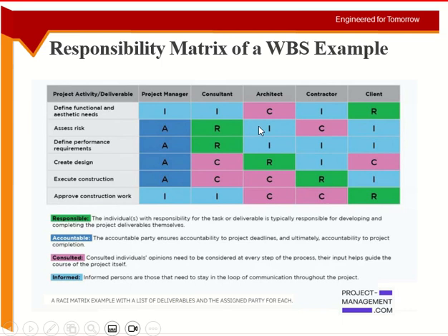It's a good practice to go back to the person who gave you the background information, that maybe you missed something, you misinterpreted something, he was saying something else, you understood something else. Or maybe things have changed. You were doing it maybe 1 week ago, now you can see things have changed even in Bahrain. Now there's a new situation, what do you propose now? So there should be some back and forth between these people, and then you go for the approval. After the approval, you go for the information stage.